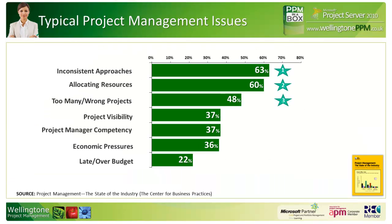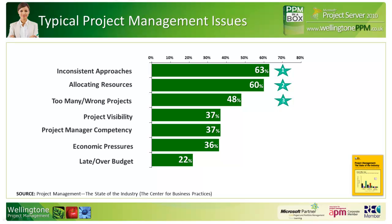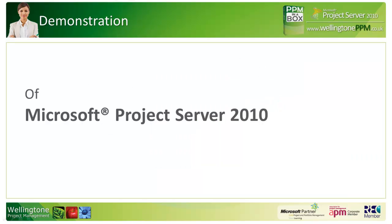Here we see the findings of a survey that was published a few years ago by the Centre for Business Practices. They surveyed a range of organizations, ranging from SMEs to large multinationals, to find out what their biggest pain points were in relation to project management. The top four issues are the ones that we see most often when we first engage with clients: inconsistent approaches to how projects are managed, allocating resources and resource management in general, too many of the wrong projects linking into project selection—making sure the projects align to corporate strategy and will deliver some form of return on investment—and last but not least, project visibility, whereby many of the clients that we deal with don't have a centralized project register or easy access to a selection of dashboards linking into projects, portfolios, and programs.